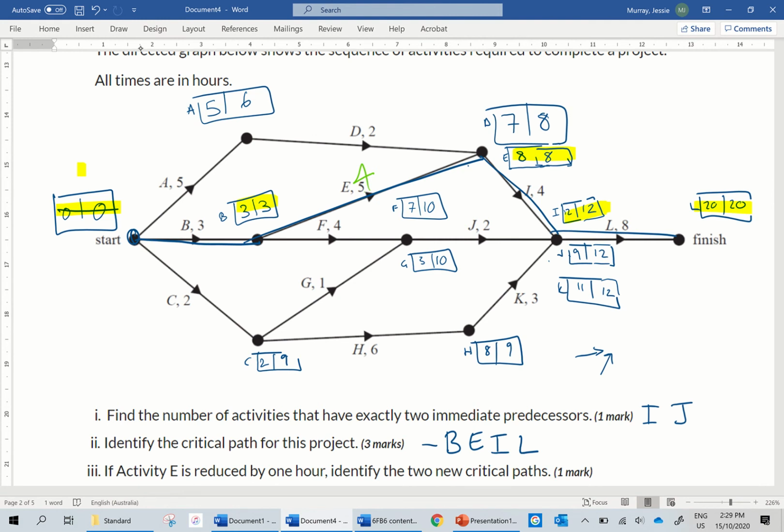So let's think about what it's changing. 3 plus 4 now instead of plus 5. So that makes a 7 here. Then plus 4 gives me 11, which makes 19. So now what happens, nothing else changes, but now I have 19. I could write this around it. 19 minus 8 gives me 11, 11, 11.